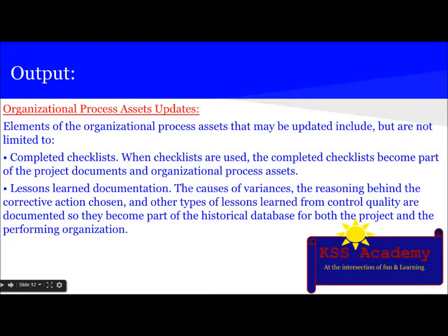So here I have explained in the past the difference between QA and QC, but I'm going to explain it again here. QA deals with audit. QA is quality assurance. It is process-oriented. It assures. Quality assurance is done by the client or QA department, and it comes under the executing process group. While QC or quality control is a kind of inspection. It deals with the deliverables, and it eliminates the causes. It is done by the team or quality control department, and it comes under the controlling process group.